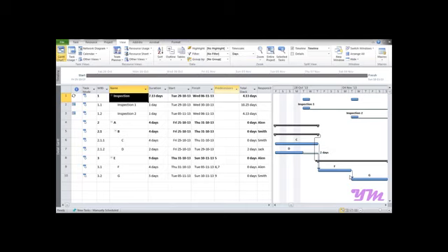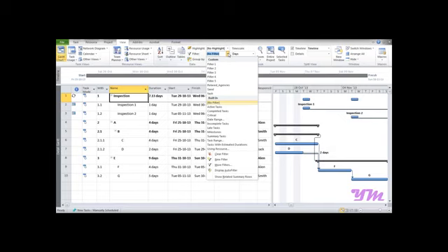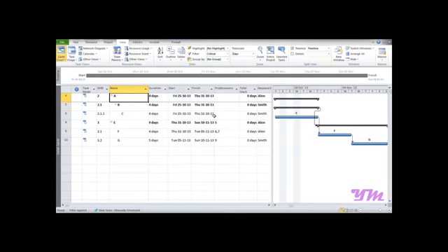Now let's look at the second part, that is filter function. In case of filter, the view is generally based on the selected criteria. So now let's get started using a filter function. To do so, we can go on to this view tab, and under that we have an option filter over here. So similarly as group, it has some built-in filters itself. So suppose if you want to look at the critical activities, you can just click over here on critical. So it would just list down only those activities which are critical, that is the activities in which total slack is 0.